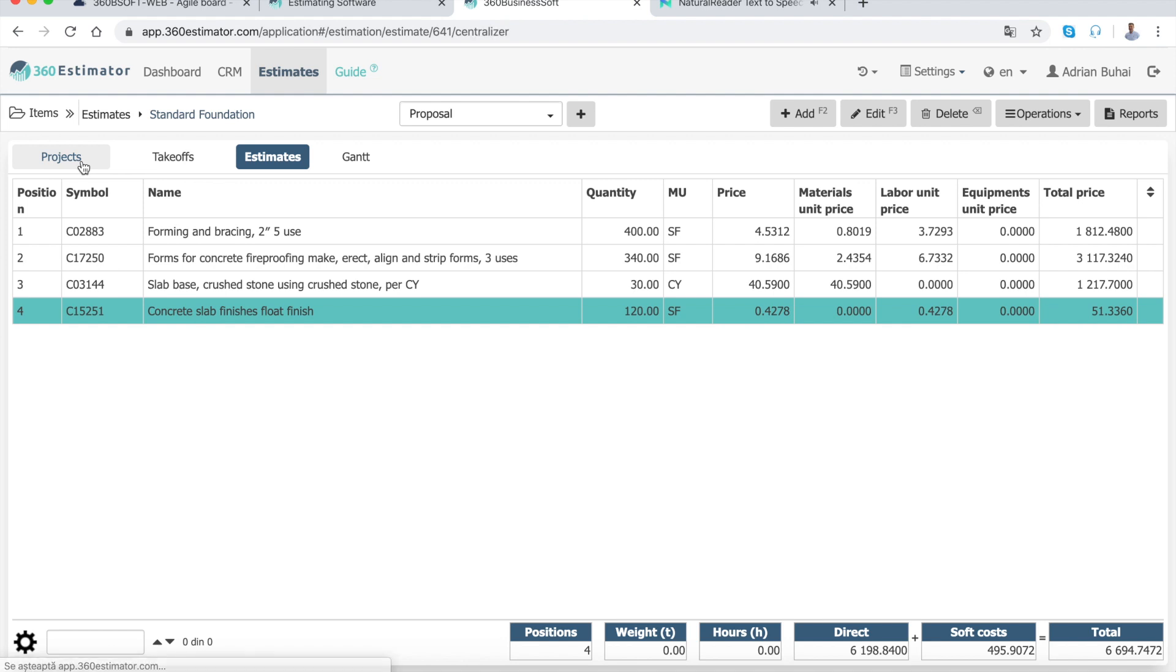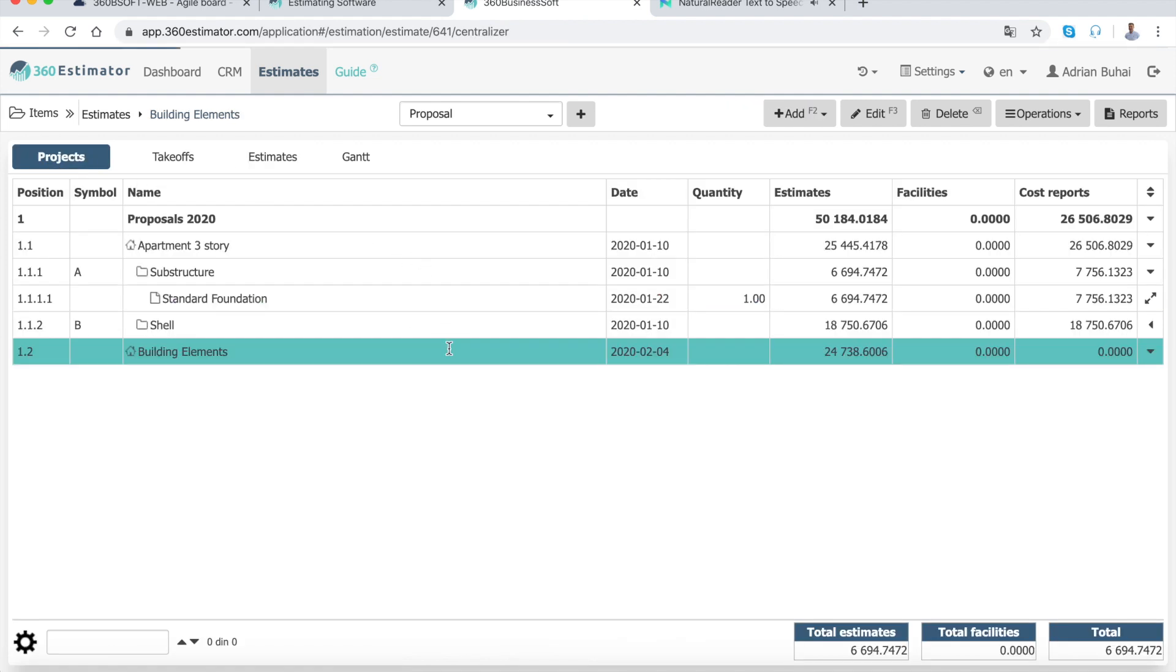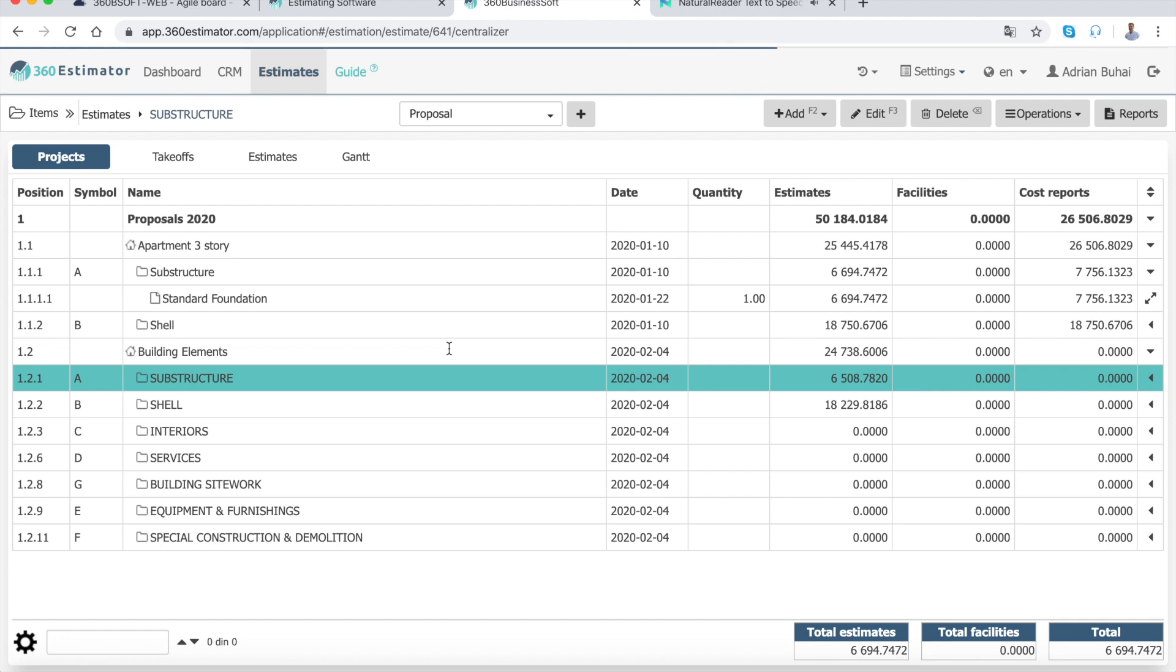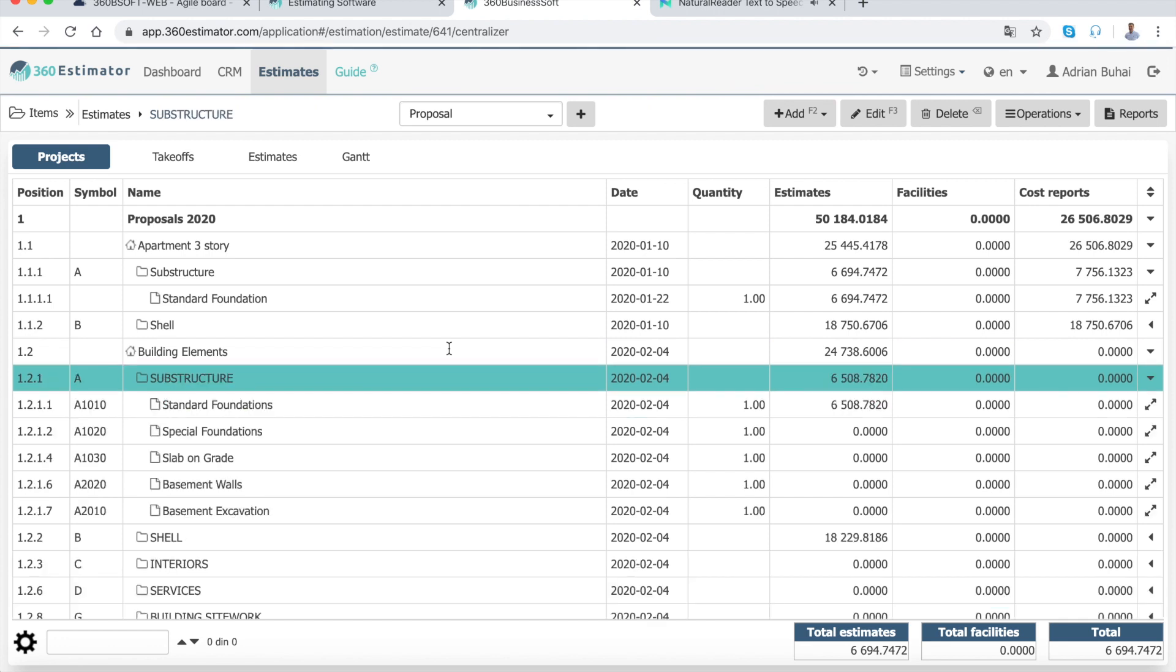Divisions are parts of a project used by general contractors to create a work breakdown structure for their projects. A division may include one or more estimates.